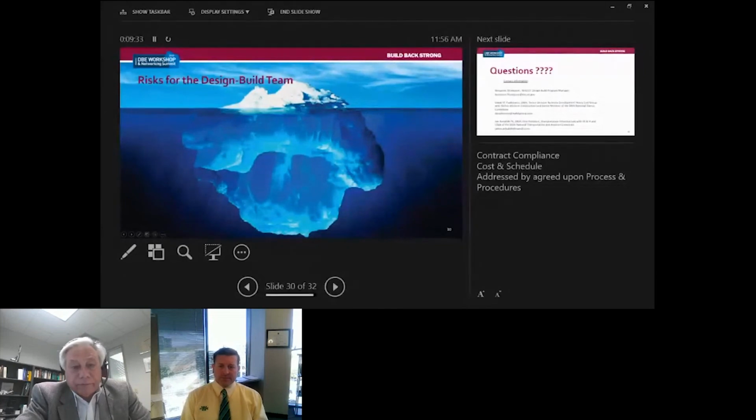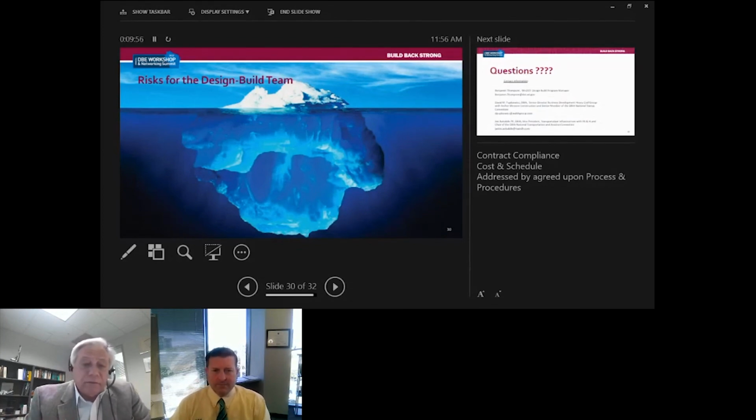So if you haven't figured it out, Dave carries the lion's share of the weight here when it comes to risk. Contractually, you try to make sure that we all have our certain responsibilities without assuming each other's risks. So we have the design risk, and at the same time, you have a specialty engineering risk. But just as is the case with Dave, if you don't do something or there's a lack of performance or an error or omission, it's going to end up falling under me as the lead designer.